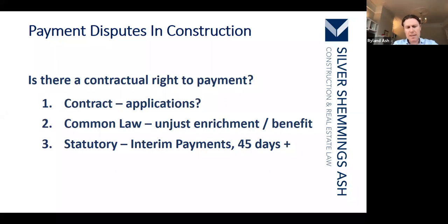So that's the common law, and often those provisions and principles and rules will apply under a letter of intent, because it can often be argued that a letter of intent doesn't create a legally binding relationship, but it will very much depend upon the terms of that letter of intent. And the third point there is the statutory right, which I've mentioned, which comes, in the context of construction contracts, from the Construction Act. Remember that the Construction Act will only apply to certain construction contracts. It excludes, for example, contracts with residential occupiers, people who are doing extensions on their homes, for example.